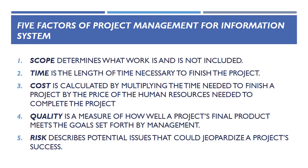Five factors of project management for information systems. First is scope. It determines what work is and is not included. For instance, the scope of a project for a new order processing system might not involve any changes to the corresponding accounts receivable, manufacturing, distribution, and inventory management systems, but rather new modules for entering orders and sending them to production and accounting.